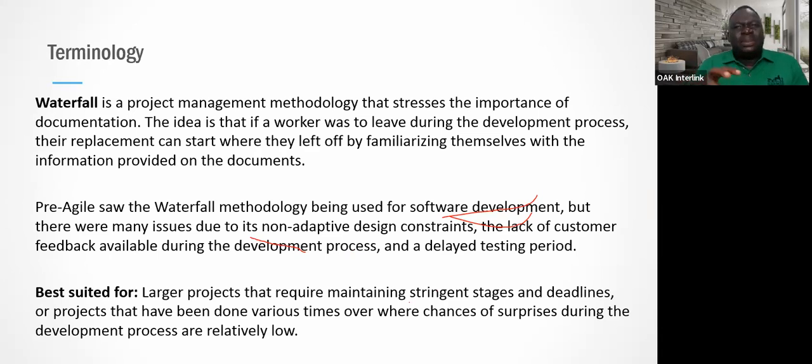In short, you can predict that if this looks like this, most likely my project is going to look like this. If past projects cost this amount, most likely my project is going to cost this amount. If past projects took this long, my project is likely to take this long. So it makes it predictable because you have templates, you have references, you have what you can actually look back on to give you an idea, to anticipate, to be able to predict. That's why they call it the predictive approach.